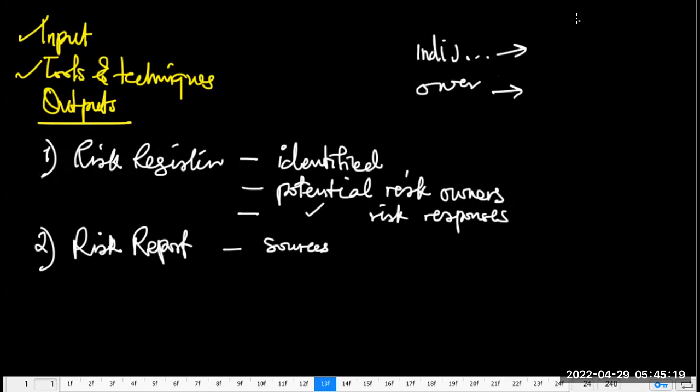In fact, if you have, say, 3 objectives, and let's say one of your objectives is to meet schedule, right? Costs, and maybe one other one. And there's a particular risk that is affecting only schedule, that falls under individual risk, right? Then affecting only cost, that is also individual. But if it affects cost, schedule, and any other objective, all the objectives you have, that becomes overall risk.